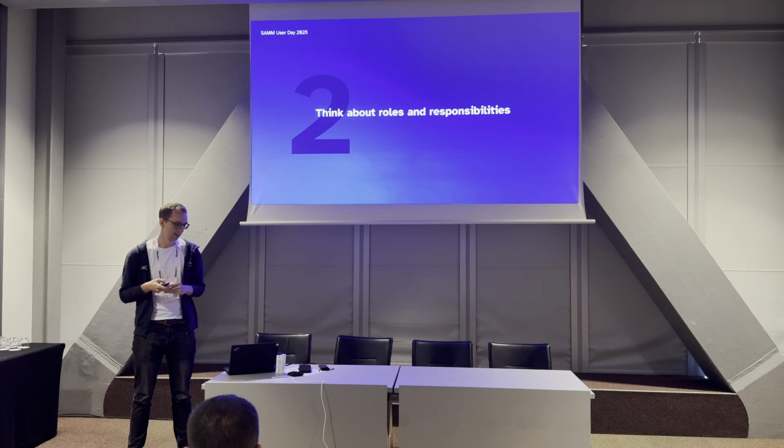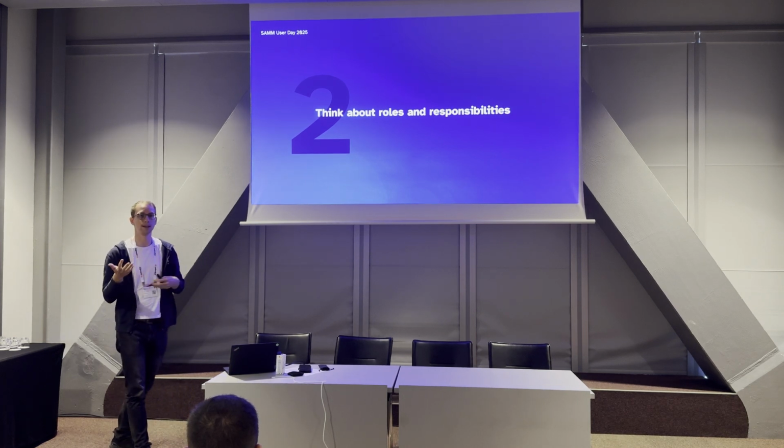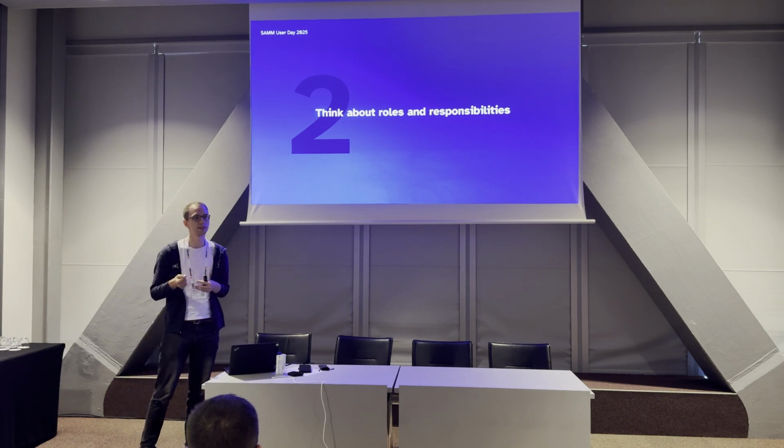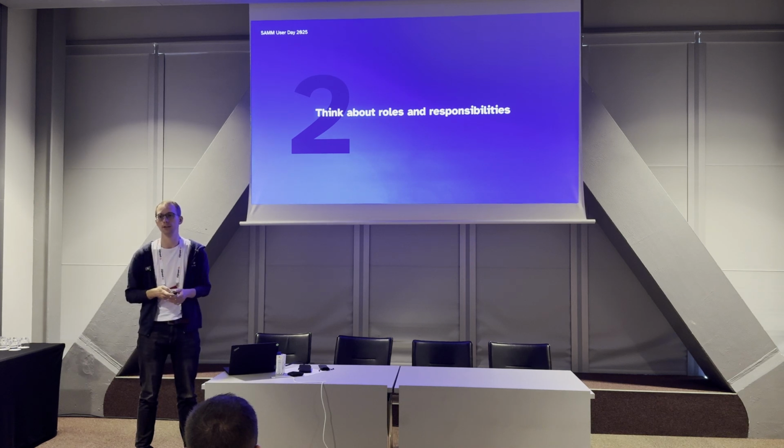So that's something I would do earlier now, not just starting with implementing different activities, but also thinking about what the different roles need to do and what they need to know. And in the end, it also helped us to put some numbers on it and estimate how much time the different roles need to do the stuff we plan to.